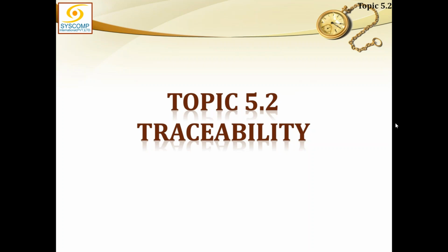Is there any question about the introduction? No, no sir, I think this is what we are discussing, that we will monitor what the requirements are, back and forth, in the forward and the backward direction, right? Exactly. Before we can come up to that level, we must have baseline requirements, properly approved by the stakeholders and agreed as baseline, because once we start work, that baseline requirement will be the scale, the level from which we will start doing the job.